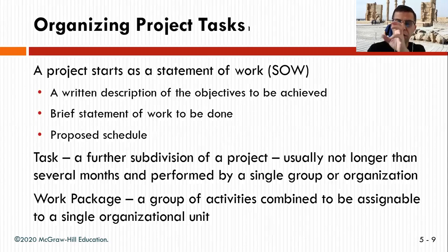So you divide, you put the timing, and you say this department will do this part or that department will do that part. And a work package, which is smaller than the task, is a group of activities combined to be assignable to a single organizational unit. So we get the task, subtask, work package, and then it's assigned to a single organizational unit.